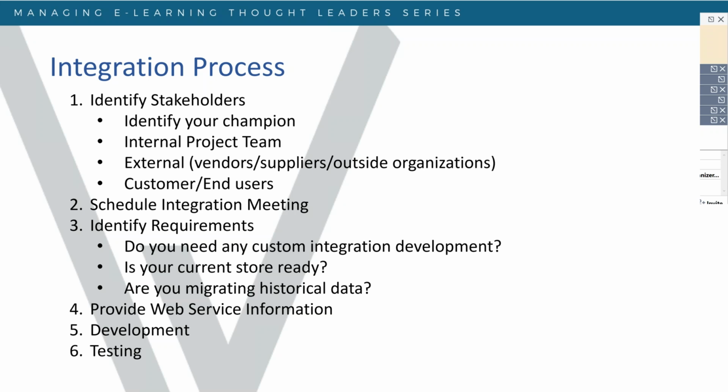Another example is, do you already have an online store that could easily be integrated, or do we need to plan to build that out as well? And also, if you're migrating historical data, which I identified in your stakeholders, involving a legacy LMS vendor, you may need to involve them if you want to pull your old LMS data into your new LMS.